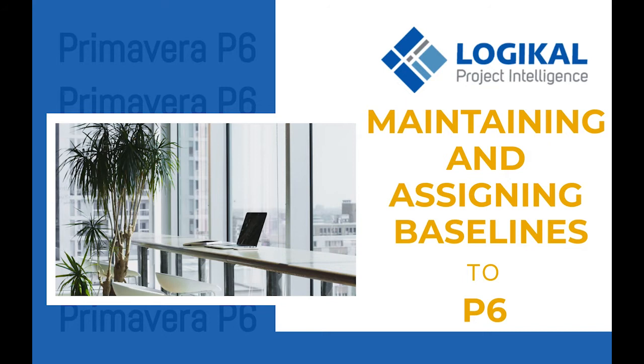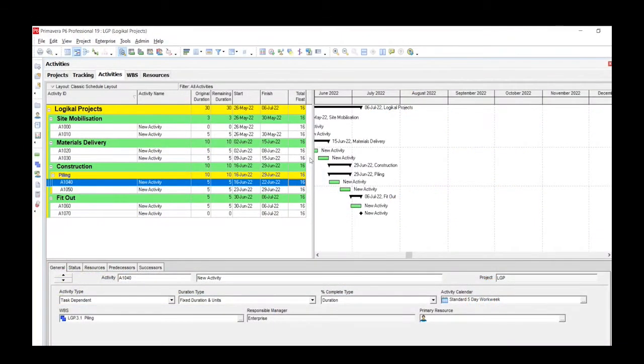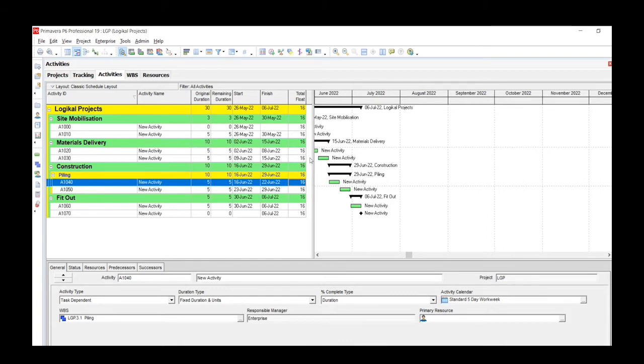Good morning everyone. Today we're going to be focusing our tutorial on assigning baselines in Primavera P6. Baselines are snapshots or pictures which provide targets against which you can track your project costs, schedule, and resource performance. It helps in evaluating whether our project is following the plan we set out to follow. Plans will of course, like anything else, change as you execute the work it describes.